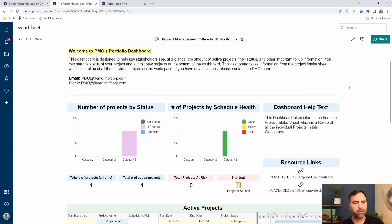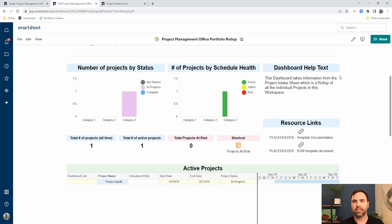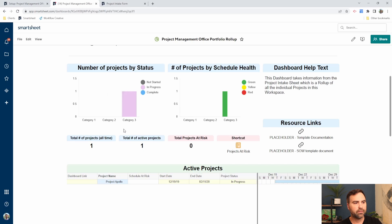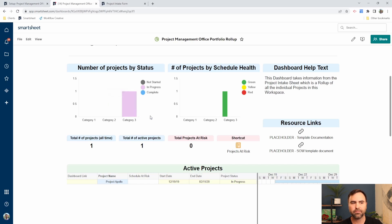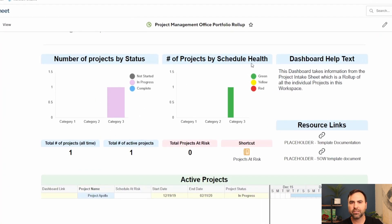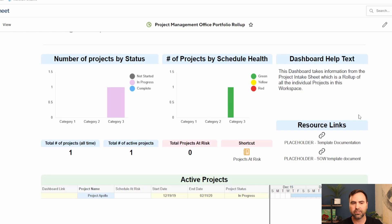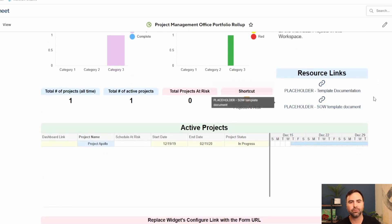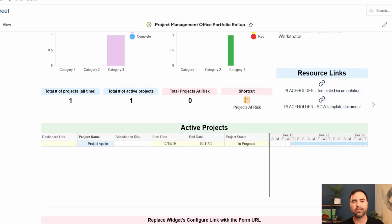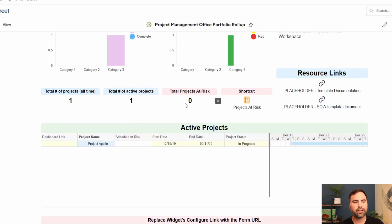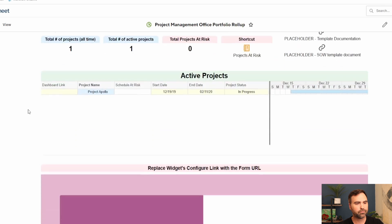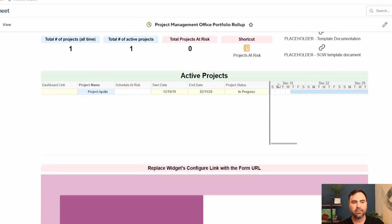This PMO dashboard is displaying information at a different level. It's displaying it at the project rollup level instead of individual projects. This chart would be used to see all of our projects that are in a certain status in these different categories as we have them listed. It's used to show the number of projects by schedule health. So all of our projects would be listed here with their schedule health indicator as well. We can display text on our dashboards. These are some more resource links that we talked about earlier. We can link to Smartsheet application assets, or we can link to external assets in our SharePoint or Google Sheets as well. And then we also have the ability just to show individual numbers, individual metrics on our dashboard.